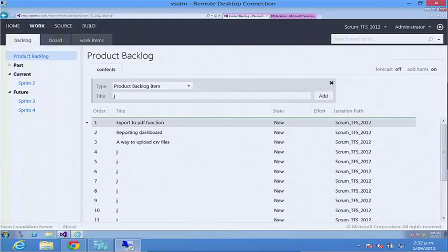The tooling takes that a little bit further and says, well, there's interesting things about a bug that we want to differentiate. What build was it found in? What are the steps to reproduce? What test cases it was exhibited in? And so that's why TFS calls them out as two different work item types.